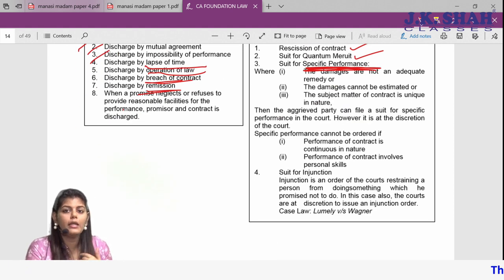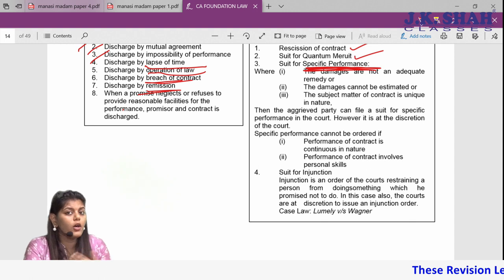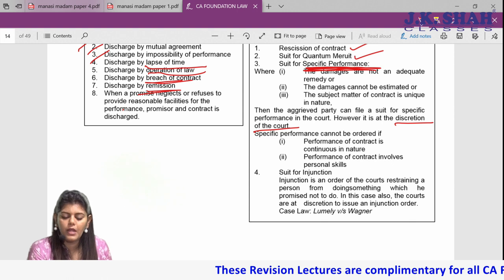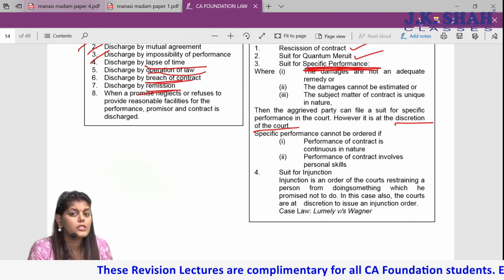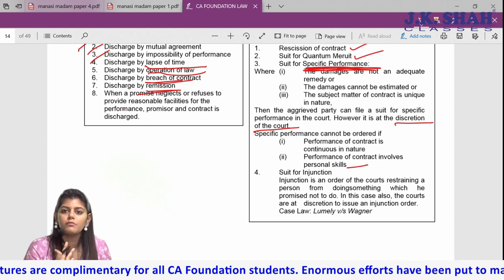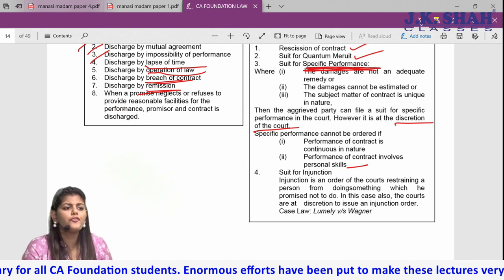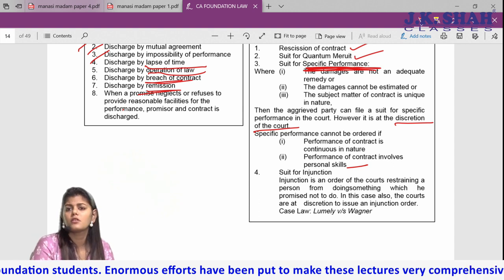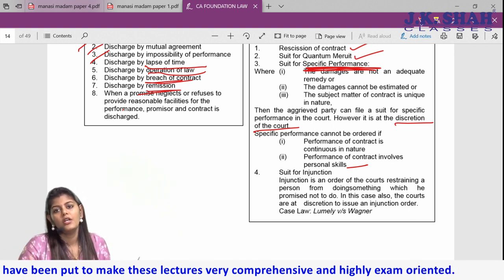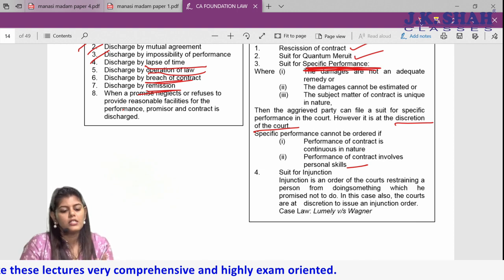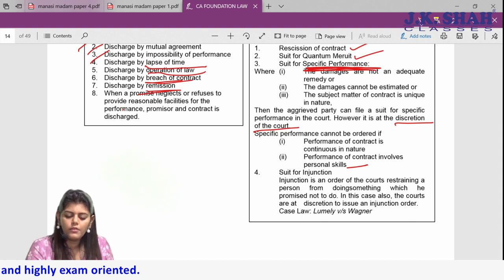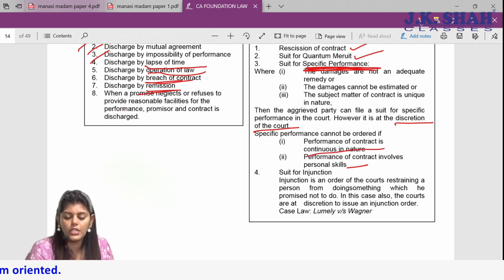You can demand specific performance, but whether you will get it is at the discretion of the court. Specific performance will not be granted if it involves personal skills — like singing, dancing, or painting — because you cannot force someone to use their personal skills. Also, if the obligation is continuous in nature, the court cannot keep forcing performance repeatedly, so it will not be granted.